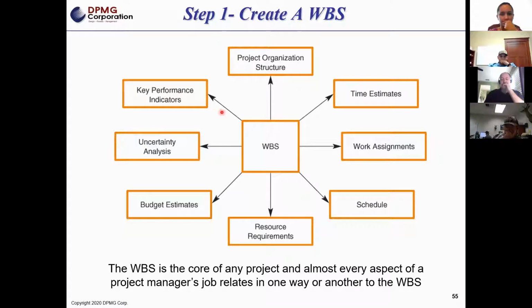Key performance indicators, and I'm not talking about whether you make money or don't make money. Key performance indicators, when we talk about a project, is you're going to look at the work breakdown structure and say, okay, let's say we're doing a design, that design is part of the work that we're doing. When design is completed, that's a key milestone, okay? That's a key performance indicator, because if the design isn't completed, you're not going to go buy materials that you're going to need. You're not going to be able to schedule the work you need to install, right? So it's going to give you the key performance indicators that are needed on the project.